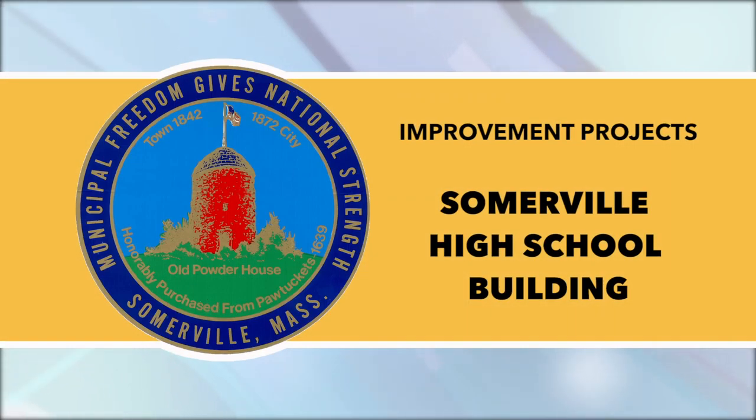Somerville High School building project. Somerville High School neighbors, please note, concrete placement for the floors in the eastern wing will begin during the week of January 6th, which will require some early morning work. Weather permitting, on Monday and Tuesday, January 6th and 7th, crews plan to arrive on site as early as 5:30 a.m. to prepare for work to start at 7 a.m.